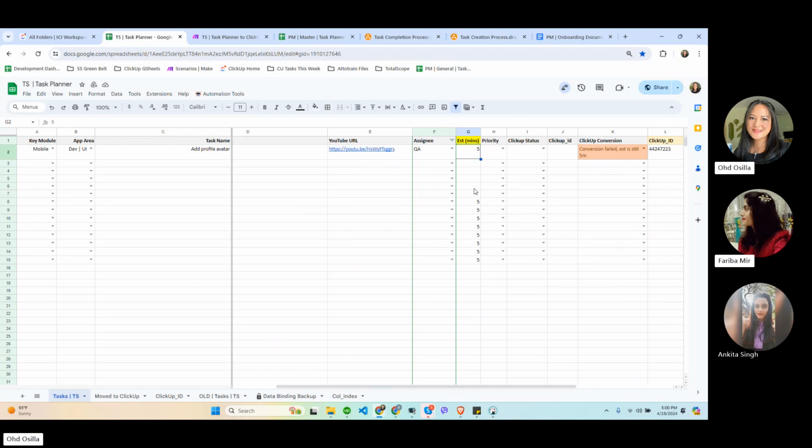If a developer or programmer comes to you and says the estimate for this task is 6 or 8, you have to ask them to break it down, because it's more manageable and easier to monitor a 4 hour task than an 8 hour task, so that we can easily pinpoint blockers and delays, right? For example, this is 180, and then you select a priority and automatically it would populate a ClickUp status.